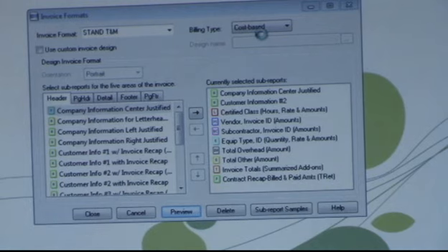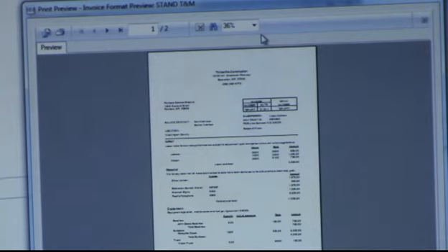You can set up what are called cost-based invoices, which will literally pull your costs out of the job cost side and then mark them up. If you have a lot of crews doing a lot of small jobs, that's a great way to go, but it requires a huge amount of setup because you have to set up ahead of time every labor code you're ever going to have in payroll and how much you're going to charge for it, so that it shows up on your invoice with the correct dollar amount. It can be pulled in from payroll and come right over. So that bypasses the project manager to create your T&M billing based on your actual costs.